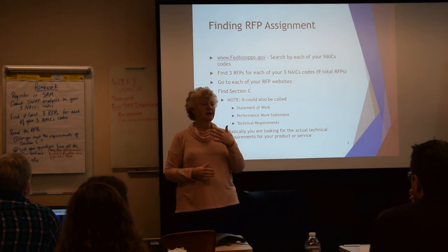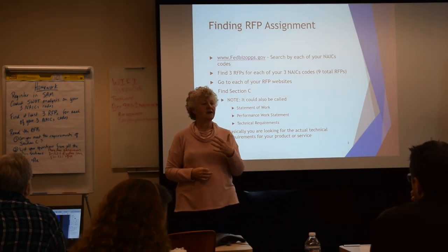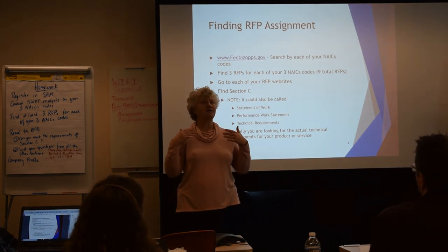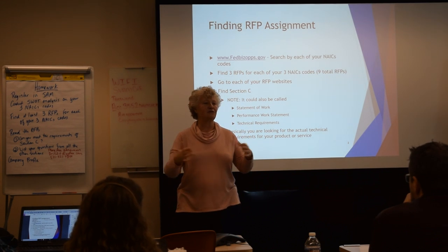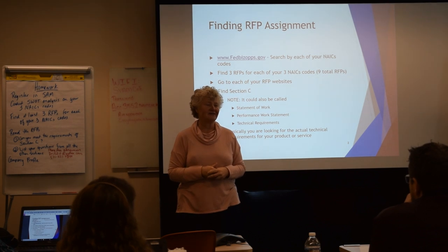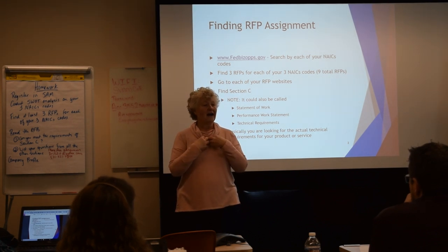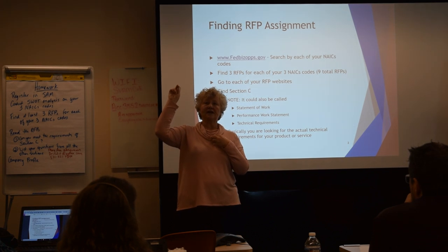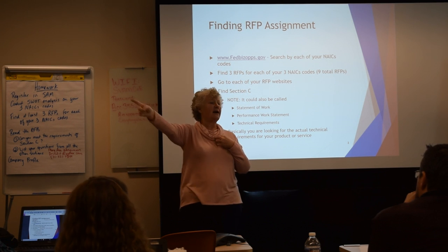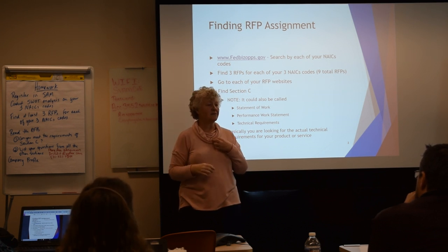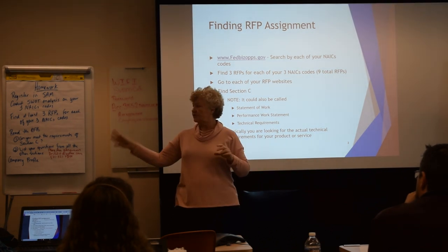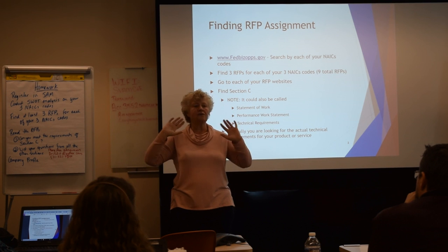Contrast that with a performance work statement, where the government says something like, and I have no idea what I'm talking about, the contractor needs to provide 60 lumens of light. Is 60 lumens a good number? Anybody know light? Let's just pretend we all know. 60 lumens of light. And I, as a contractor, could put together this configuration. I could put together one big skylight that indirect light comes, sunlight comes through. I could do little spotlights. I could do like mood lighting in here. I could do whatever I wanted.